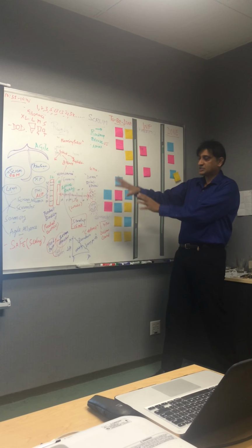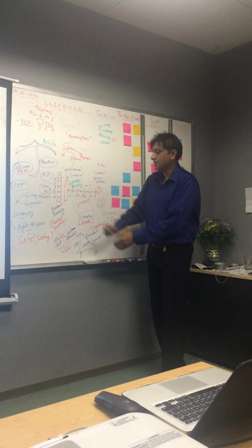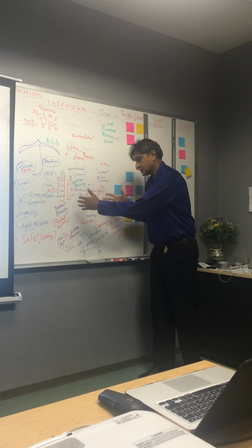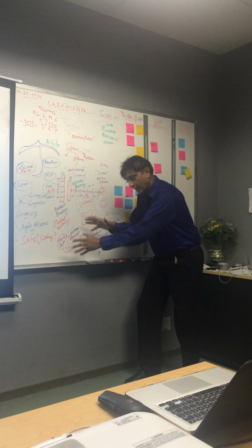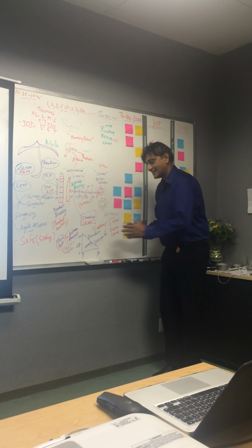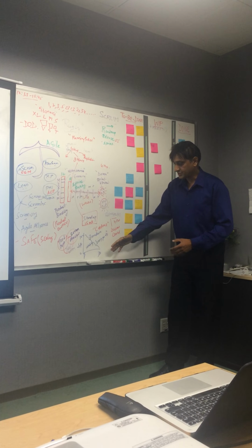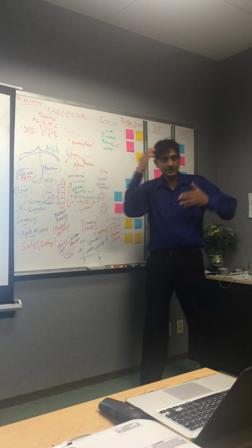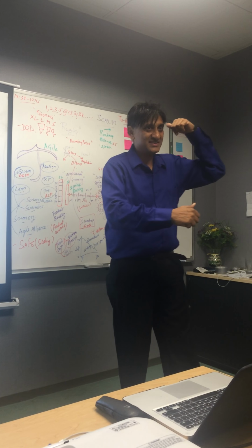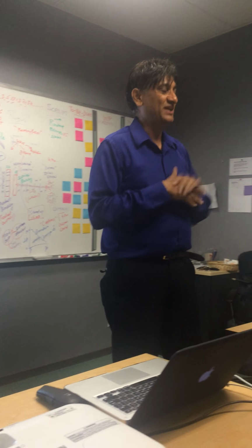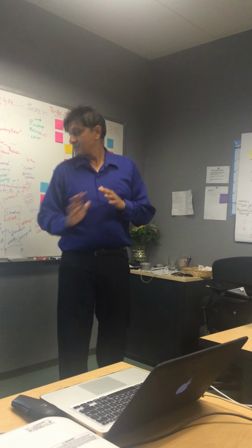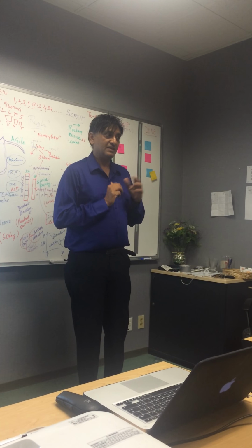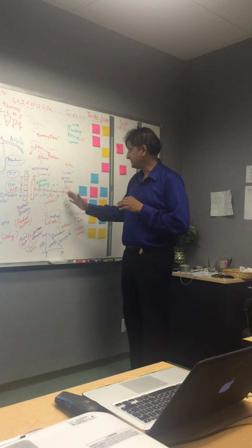So you see here on the board the sprint. We start with the product backlog. We have a sprint backlog, and then we start the sprint. We have the team ready, the product owner, the Scrum Master, and the dev team. We measure the progress, the velocity, the burn down in a daily stand-up meeting in which we discuss what we're doing today, what we did yesterday, and what is stopping us, right? So very, very precise. The team, which is probably 7 ± 2 people, try to deliver that in a short span, right? So that's what we achieve in the sprint.